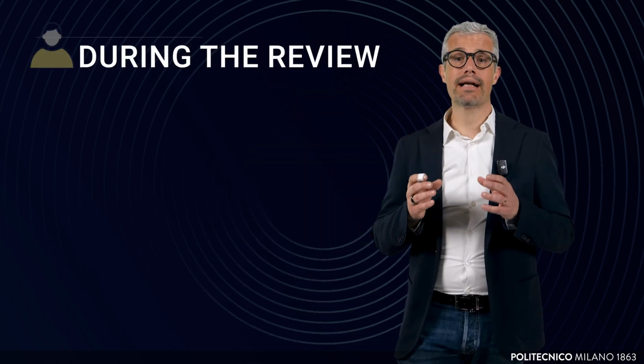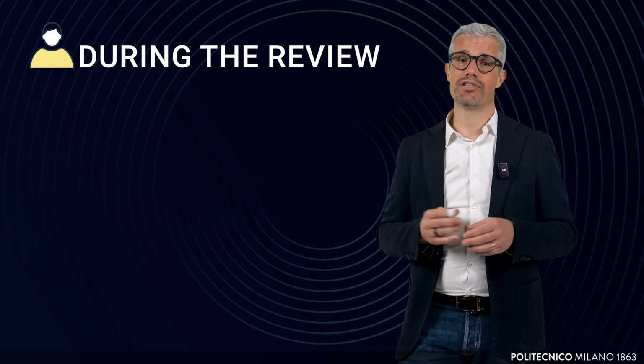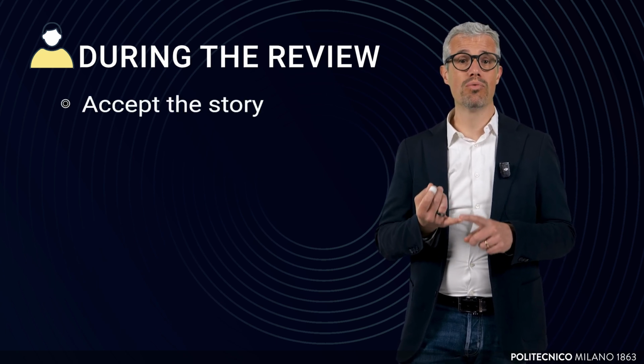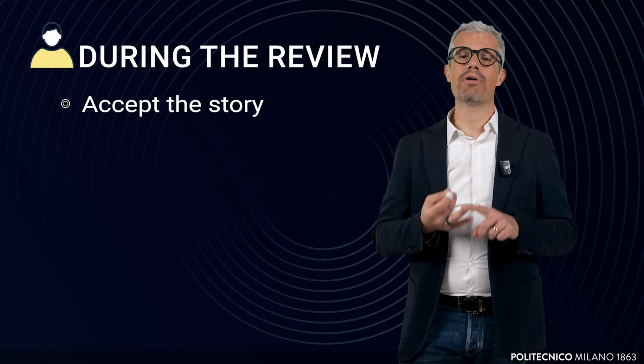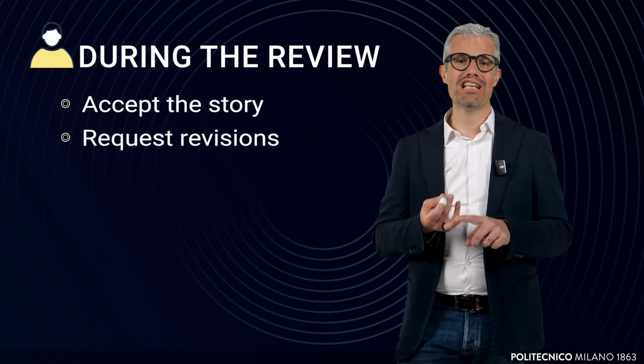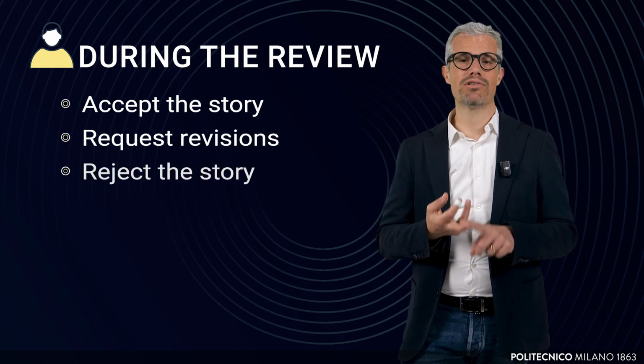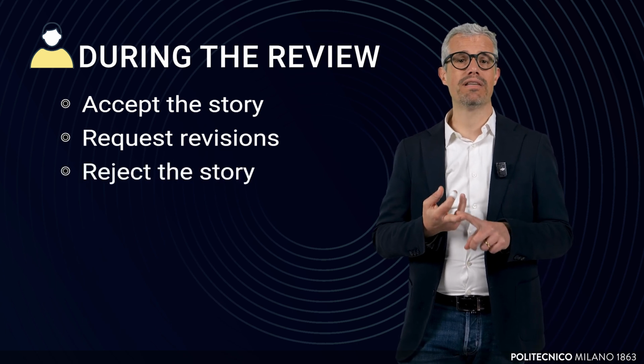During the review, the customer has three options for each story. Accept the story if it meets the requirements and works as intended. Request a revision if minor adjustments are needed to align with expectations. Or reject the story if it doesn't meet the agreed-upon definition of done.